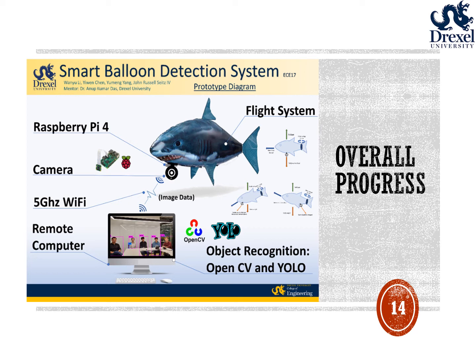As mentioned in the solution slide before, the team did not complete all planned parts of the project. One of the main issues is that each part was worked on independently before the changes to the class, so integrating all the parts became impossible while staying physically separated. At the end of the prototyping, the team is able to use our Raspberry Pi to control the flight system, but it exceeds the weight capacity of the balloon. Solutions to improve this, such as adding smaller balloons or using small fans, were also being researched.